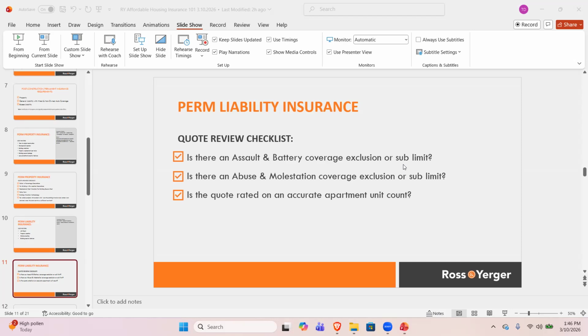It could have the square footage wrong. We would pull building plans, look at the square footage there, and input those into Marshall Swift. So I think having an independent valuation done helps justify a lower insurance replacement cost value that you're comfortable with, but you're going to have to take that step to make your lender syndicator comfortable with it.